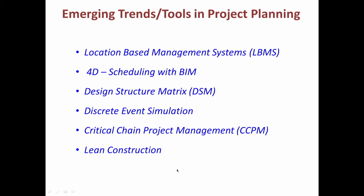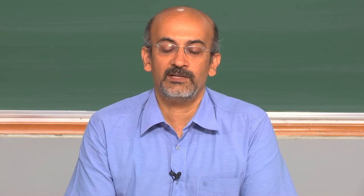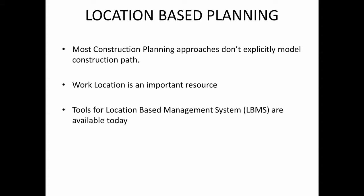I will also briefly touch on lean construction which is based on manufacturing principles. When we go into location based planning, so far in CPM we did not take location explicitly into account. We did not talk about what the construction path is going to be. We just talked about activities and solved activity-based times, looking at early start, early finish, and resources. But actually location and space is also an important resource.